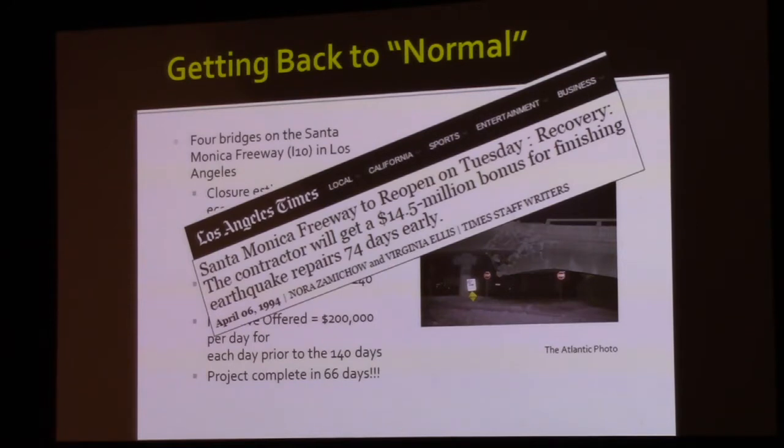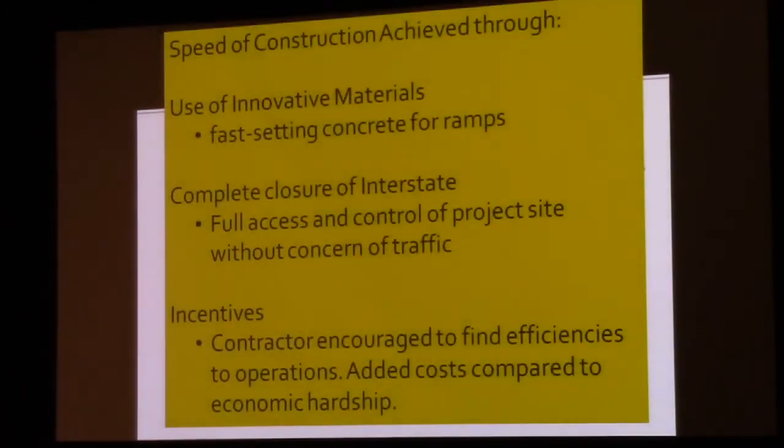But when you compared it to the cost in the economy of lost transactions, you're probably looking at a savings of about $59 million by finishing it early. So you take $15 million so you can save the economy and the region $59 million, that's not a bad thing. But just like all good pilot projects, what did you learn? What did we learn from it?